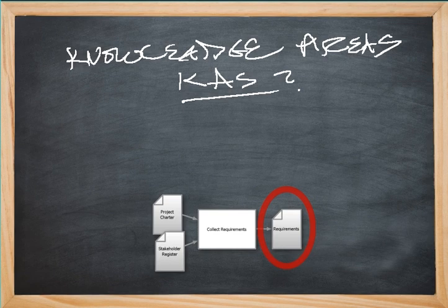to successfully implement. There's a couple of other ones that are showed in dotted lines that are, I believe, somewhat optional, and a lot depends on the sophistication of the project and the complexity of the project. Generally, I would recommend not using them, but I did want to cover them really quick. The first is a requirements management plan. This describes how requirements will be analyzed, documented, and managed. And finally, the requirements traceability matrix is a mapping to the business and project objectives you stated earlier in your project charter. This is where the fun part begins. So let's get rid of those guys.